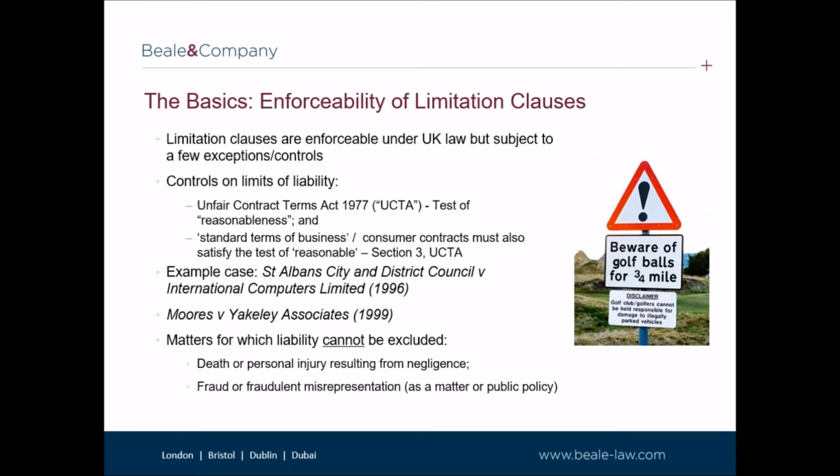As well as the controls I have just mentioned, liability clauses and exclusions are subject to a few exceptions. For example, pursuant to UCTA, liability cannot be excluded or restricted for death or personal injury resulting from negligence. As a matter of public policy, liability cannot be excluded for fraud or fraudulent misrepresentation.